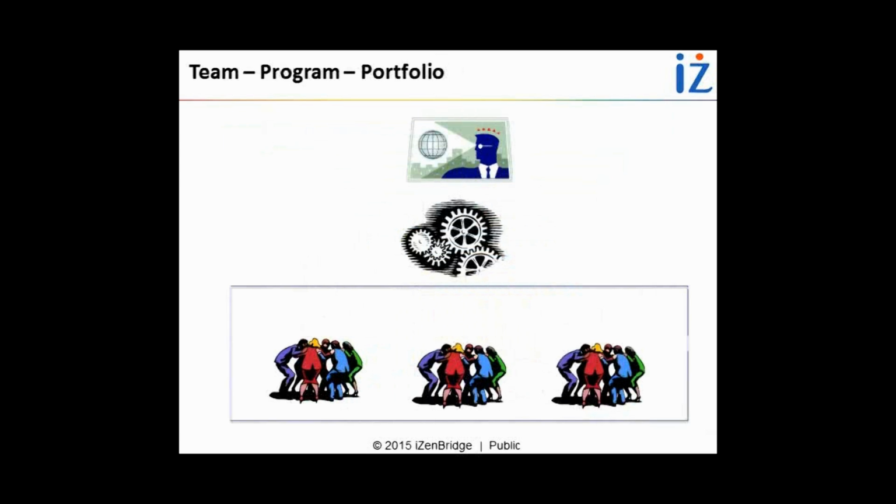It does this by providing 3 levels: a team level, a program level, and a portfolio level. The team level is like normal Agile teams, where 7 to 9 people work on their user story backlogs and deliver working software in sprints. Then we have a program layer. The program layer primarily focuses on integrating, coordinating, managing interdependencies, and giving direction to all the teams working in an interdependent environment. These teams are not independent; their output does not go directly to the end customer. It has to be integrated with other teams. That's why we need a program layer, which helps us achieve system level, project management level, release level and requirement level integration. So SAFe has this second layer, the program layer.